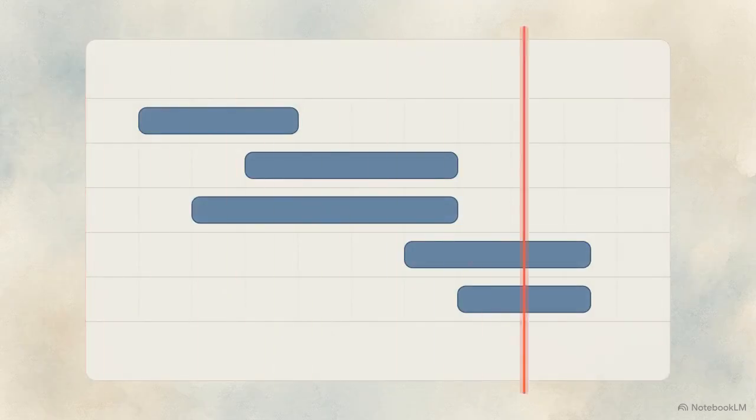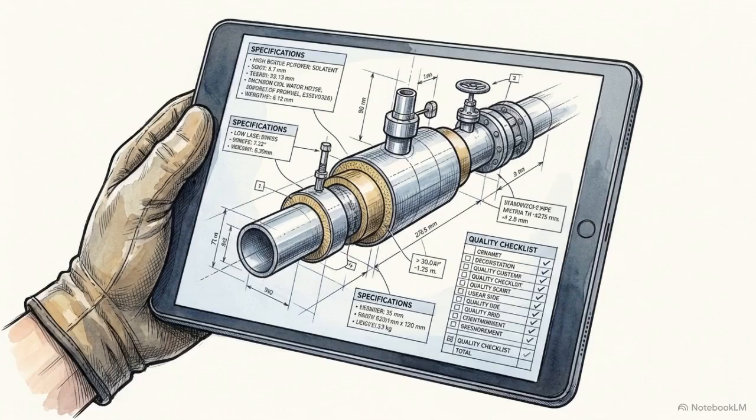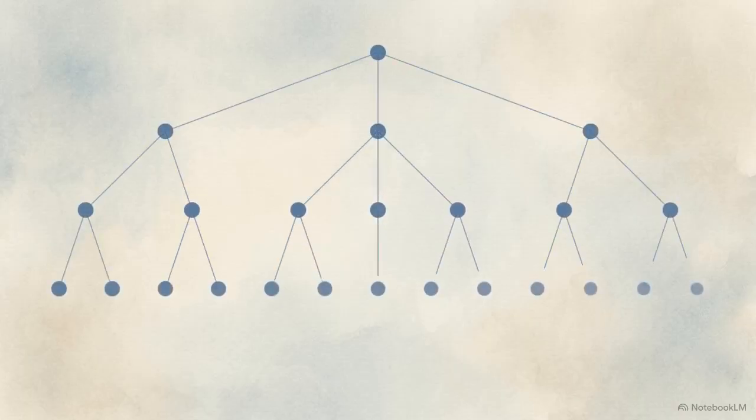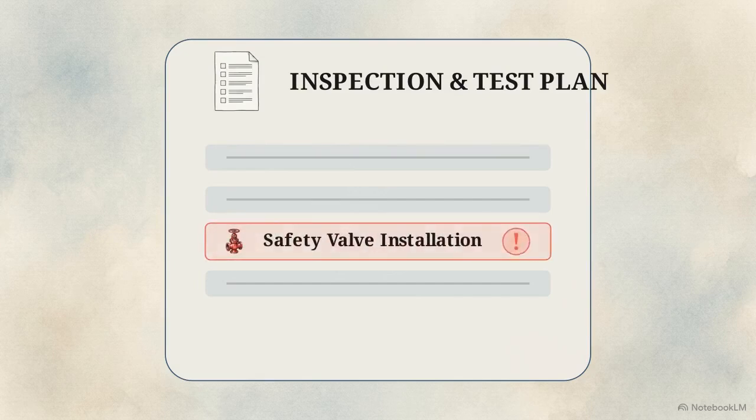Separating these tasks into distinct plans allows for comprehensive inspection and targeted tracking. It enables the team to develop customized quality plans that address the unique technical requirements of that specific subset of work. Isolating critical sub-activities within these plans is essential. By identifying which tasks have the highest potential to impact overall functionality, teams can focus their quality control efforts where the risk of failure is most severe.